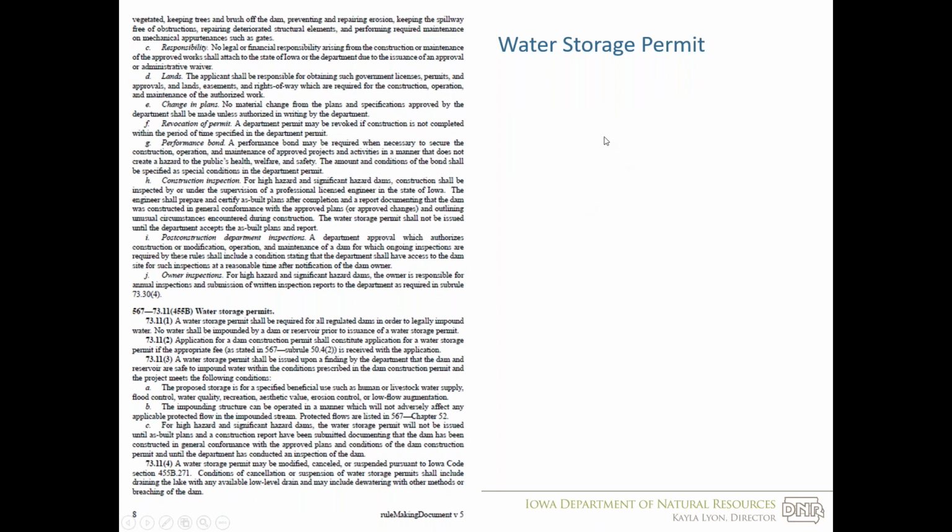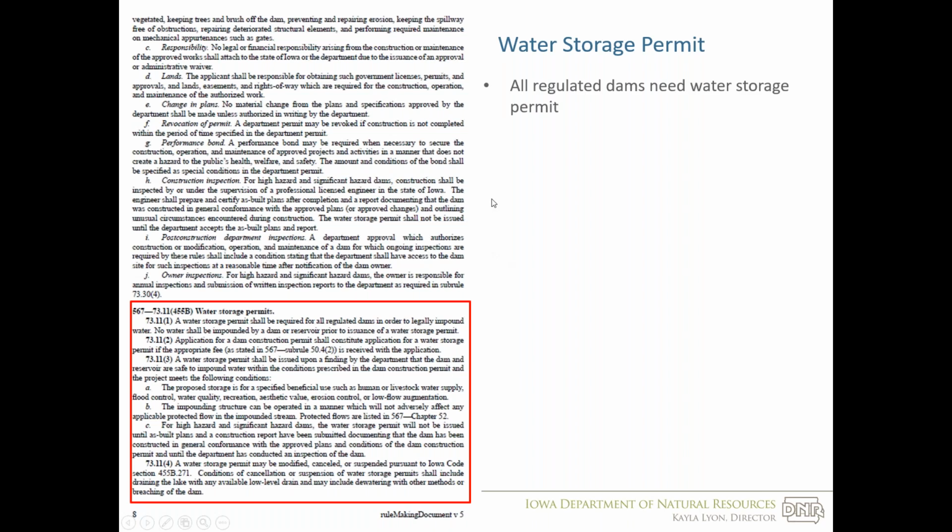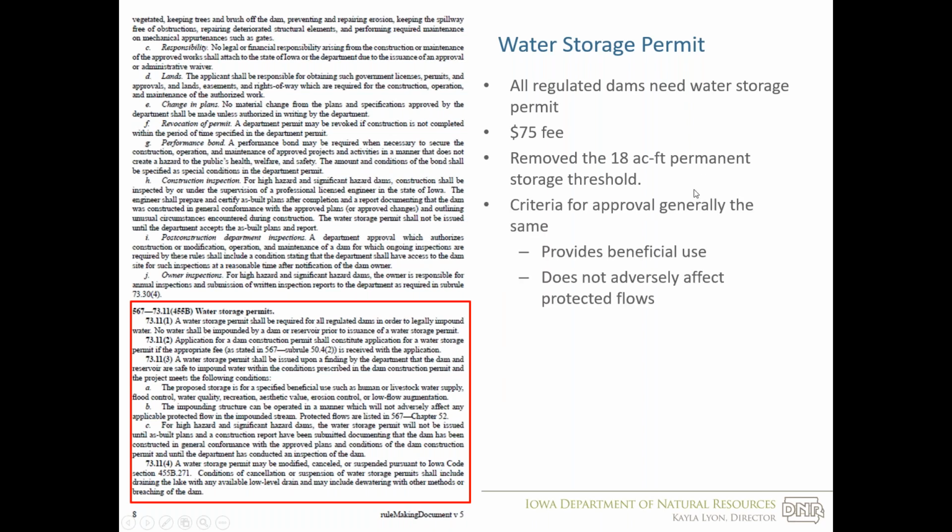The water storage permit is needed for all regulated dams. It does include the $75 fee that hasn't changed from before. We removed the 18 acre feet permanent storage threshold, and so it applies to every regulated dam. And the criteria for approval of the water storage permit remain the same. It just needs to provide a beneficial use and not adversely affect protected flows.